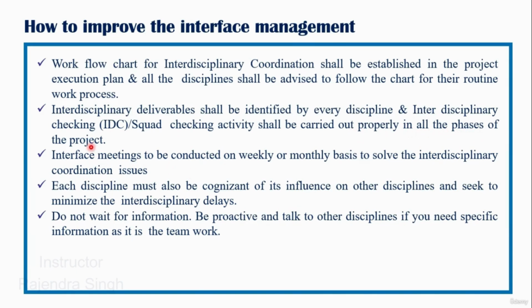So each discipline has the responsibility to prepare their own interdisciplinary squad check requirements, which in turn have to be aligned with all the department heads for a project, and that shall form the basis of the IDC matrix or squad check matrix, which has to be rigorously followed, diligently followed throughout the project lifecycle at different stages of the project.